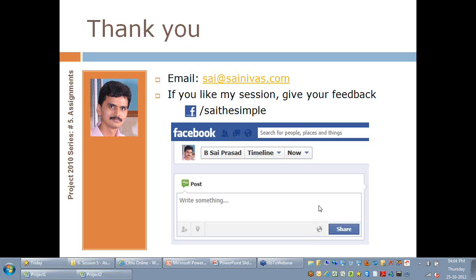So every plan will have some kind of contingency attached, but I would recommend that based on how important that particular buffer is, if you want to expose that buffer to the customer, make sure that you have a task name like contingency reserve or something else. If you don't want it to be exposed, I would recommend padding it as a part of the individual task estimates, so that your schedule can be dynamic.